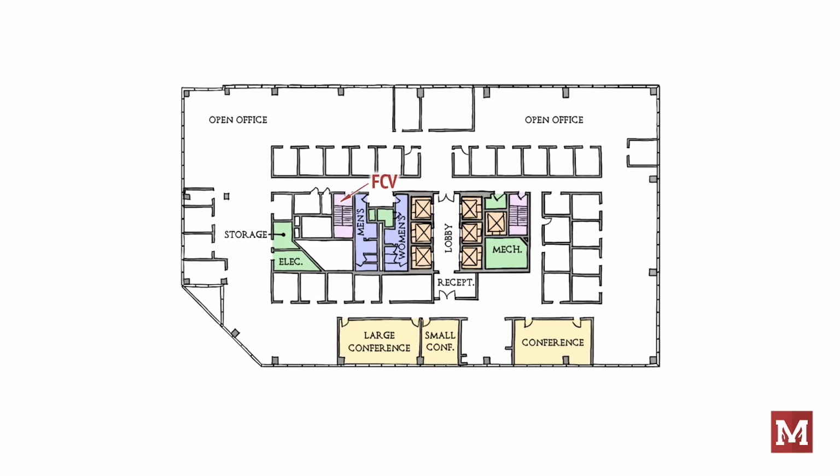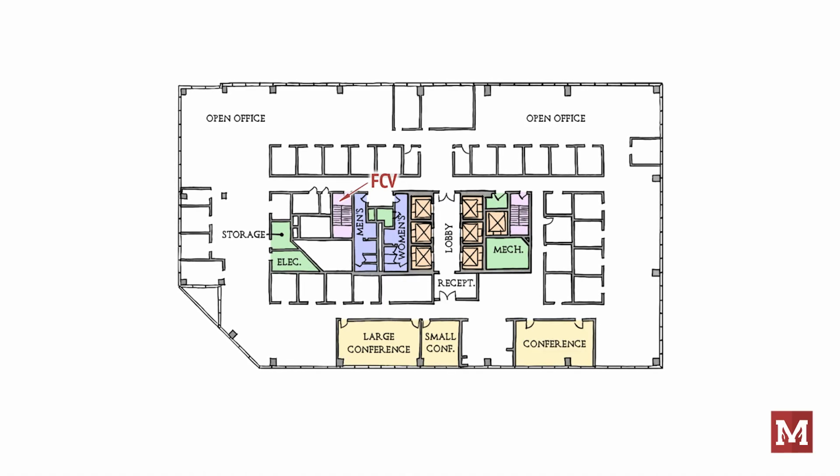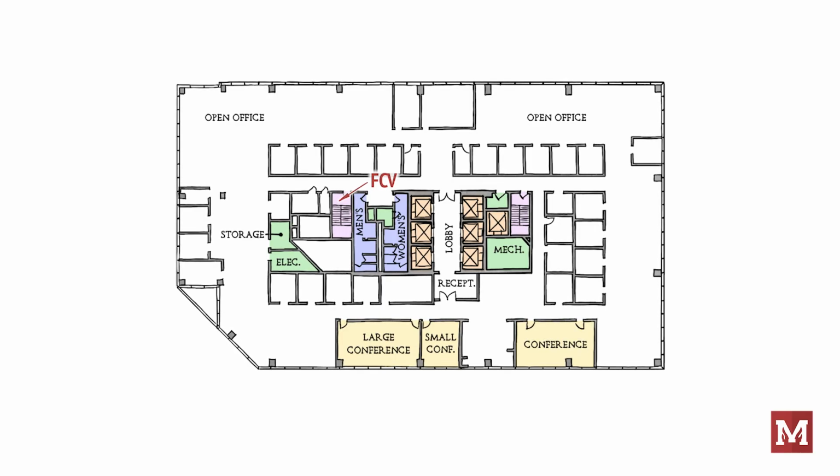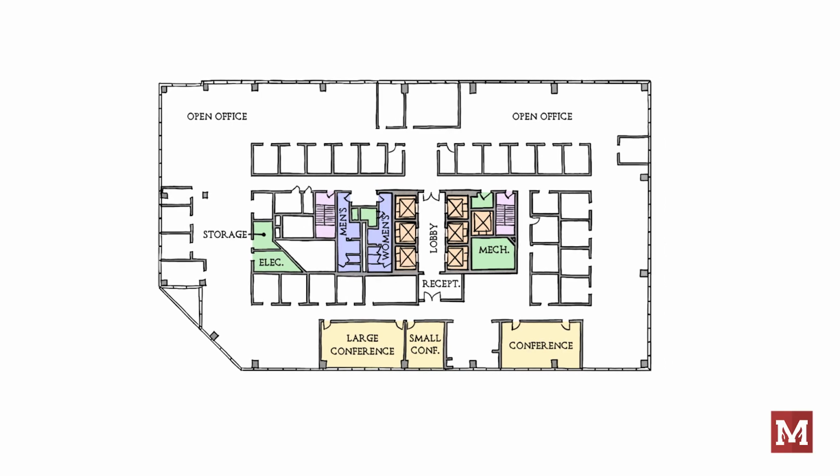All right, so we tagged it, but that doesn't really convey any scope. It identifies an object, but it doesn't define responsibility. Is it an existing one shown for reference, or is the contractor providing a new one? And which contractor? The note needs to provide direction. Tell the contractor if it's in their scope or not, and if so, what they need to do with it. What action is required?